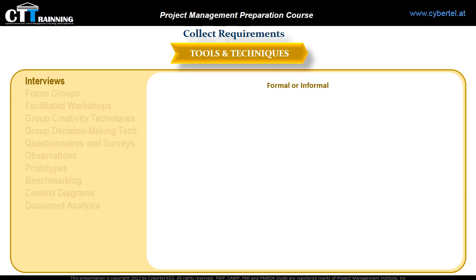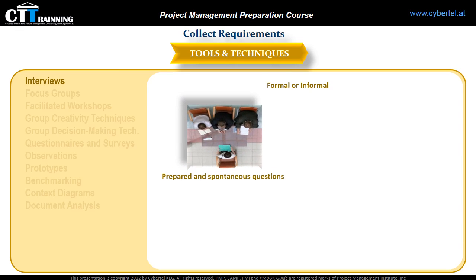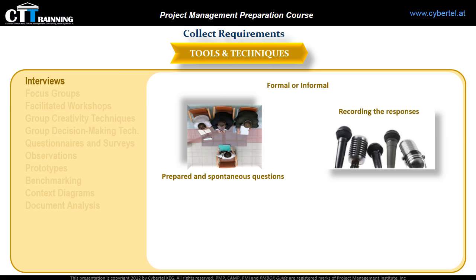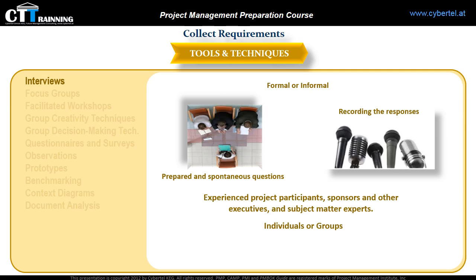An interview may be formal or informal. You collect information from stakeholders by talking to them directly, asking prepared and spontaneous questions and recording the responses. Who should I interview? Experienced project participants, sponsors and other executives, and subject matter experts. This will improve the effort of identifying and defining the features and functions of the deliverables. Interviews are performed with individuals or groups. You may also perform interviews for obtaining confidential information.